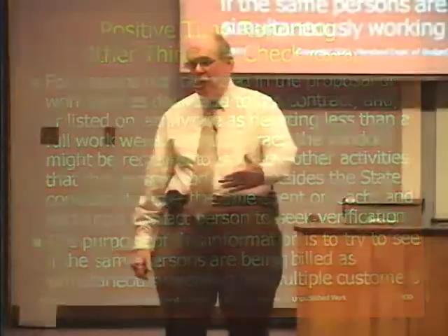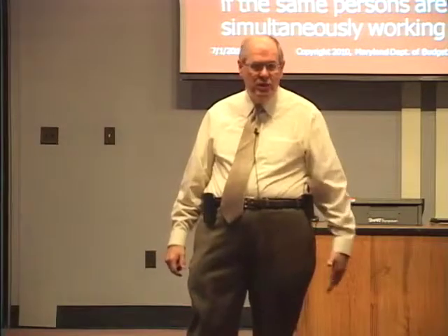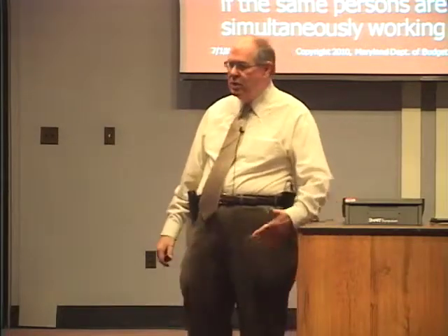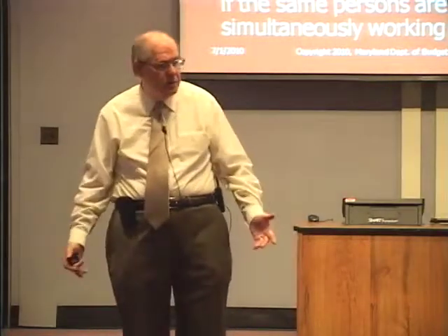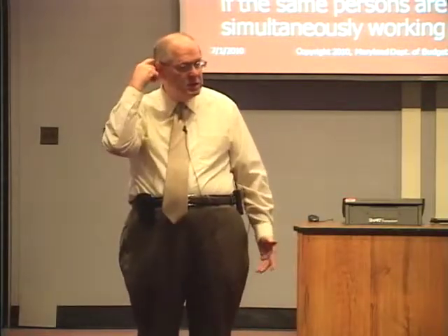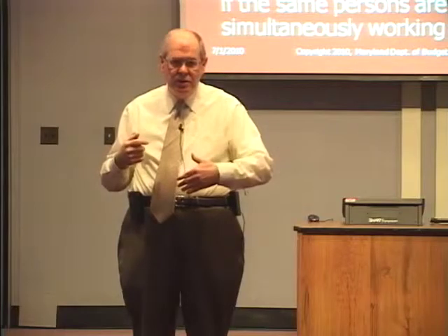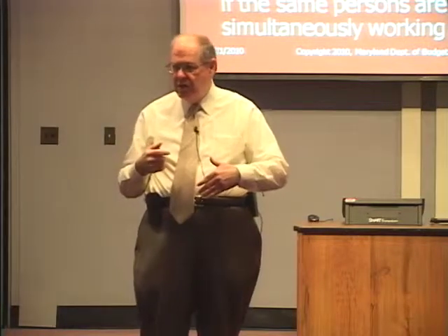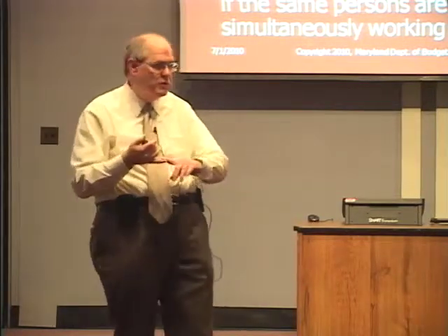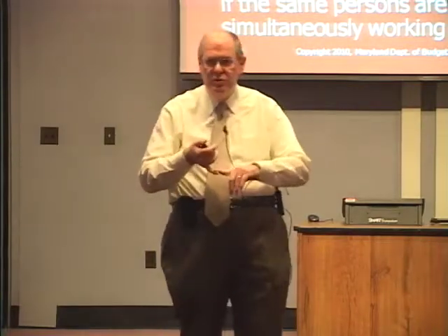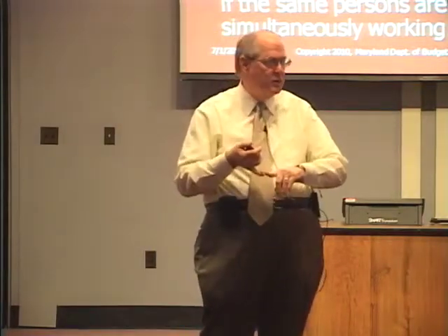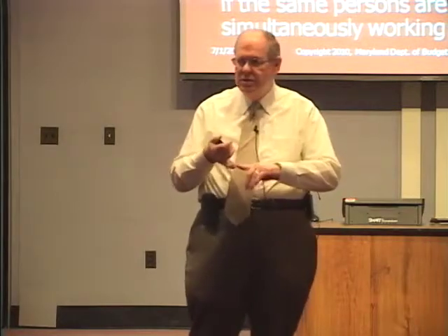So if I don't know that you're working on my contract full-time and you list someone that worked for 15 hours, depending upon my specifications, I might say, along with the statement that they worked 15 hours on my contract, under the assumption they worked 40 hours in a week, tell me what other activities this person worked on for the balance of the 40 hours so I can see what is said.